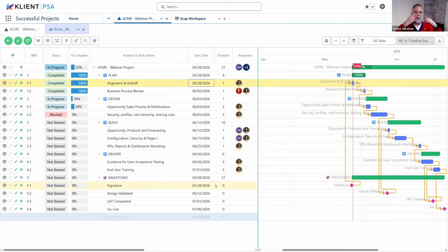So this is what we changed, making sure that we didn't break anything and it's backward compatible for existing customers. The setting remains, meaning that duration is one. If you want to switch it, it's in the client configuration, custom settings. It's the milestone duration. You just need to check it, and then you're going to be enabling that zero day milestone.